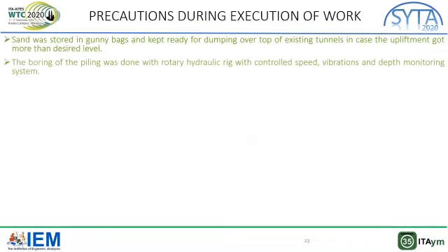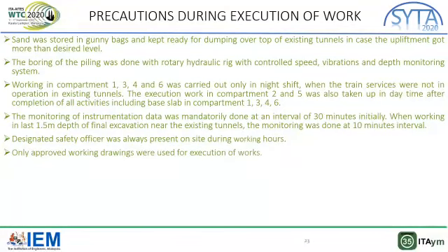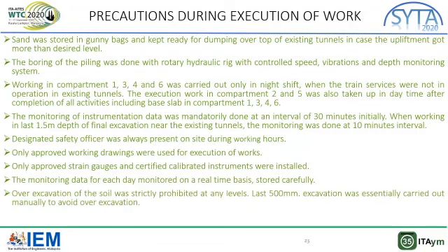Preparation during execution of work. Sand was stored in gunny bags and kept ready for dumping over top of existing tunnels in case of upliftment got more than desired level. The boring of piling was done with rotary hydraulic rig with controlled speed, vibration and depth monitoring system. Working in compartment 1, 3, 4 and 6 was carried out only in night shift when the train services were not in operation in existing tunnels.